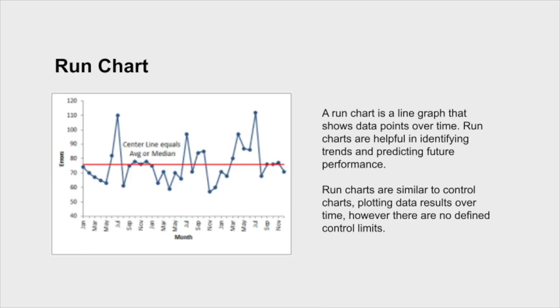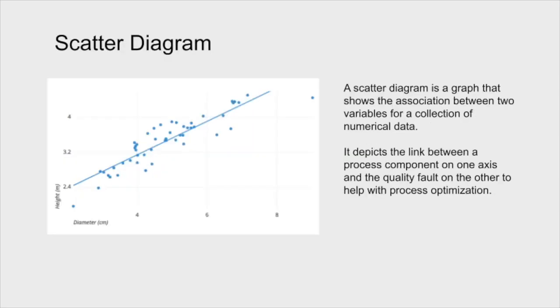A run chart is a control chart without the upper or lower control limits. Effectively, you look at a run chart and we do exactly the same thing. Time moves along the horizontal and we assess what our standard is, which is the red line, and we're saying, is this above the standard or below the standard? And if it really goes out of whack, meaning it's really below the standard or consistently above the standard, then we need to manage it somehow or another. It's not within control.